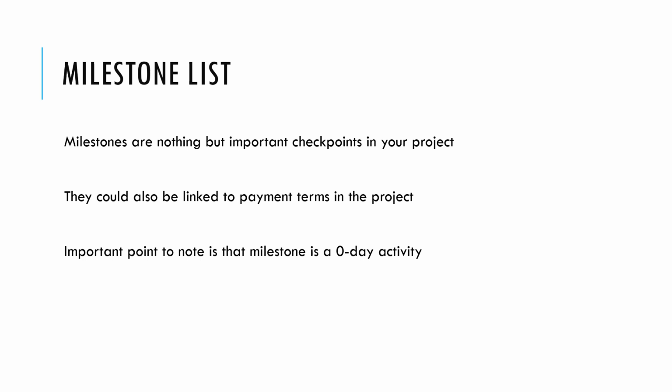So a milestone never consumes a time period. That is something that you should know. A milestone is only a point in the project, and it is a 0-day activity. Your code completion day, the end date of your code completion, the ETA, the last date, is going to be the milestone of code completion, not the entire duration from your code start date to your code end date. I hope that was clear.